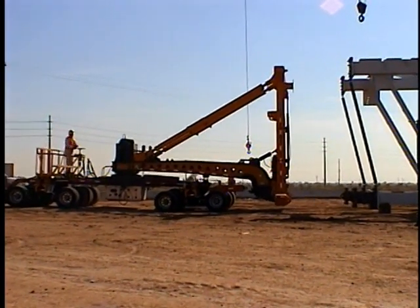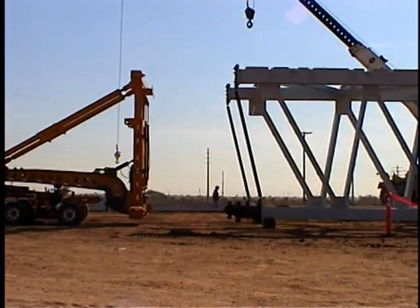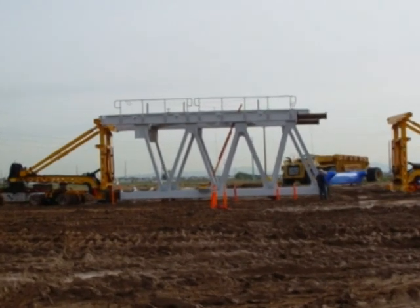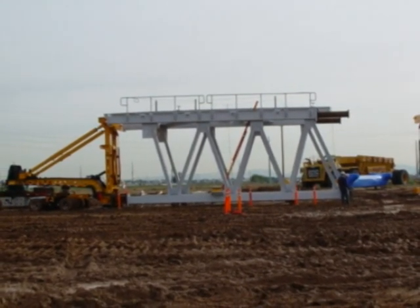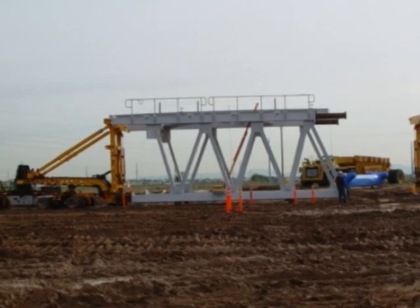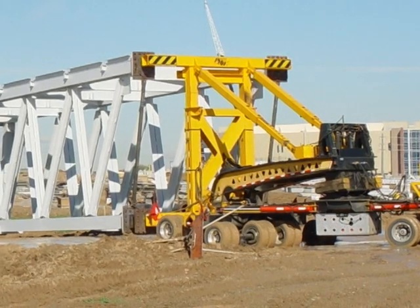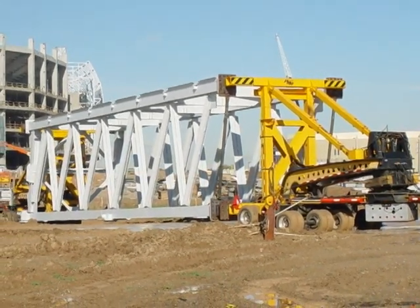This required PHH to manually detach from the trusses, leaving them on cribbing. During this time, Schuff Steel workers added mounting brackets, safety barricades, and catwalks to the trusses, adding 5,000 pounds in weight and an additional 7 feet in width. Once the staged trusses were prepped and ready for the trip down the 6% grade, PHH moved in and manually reattached the section to the trailer.